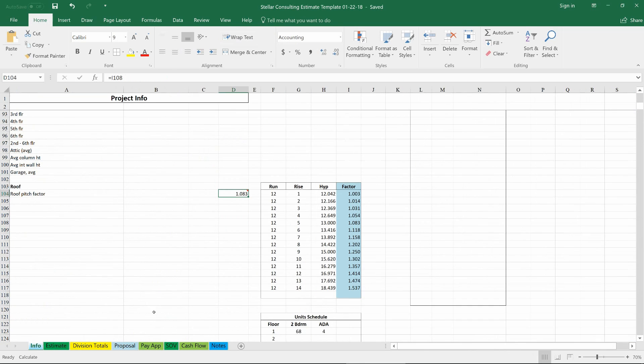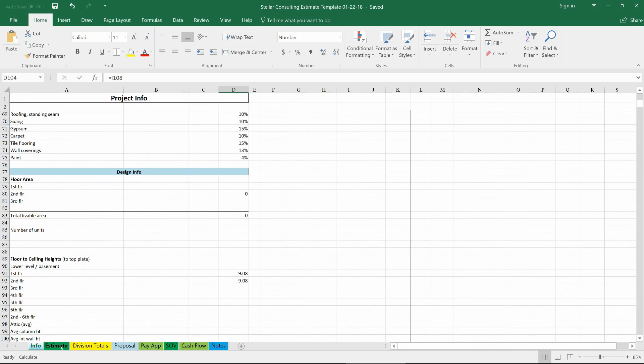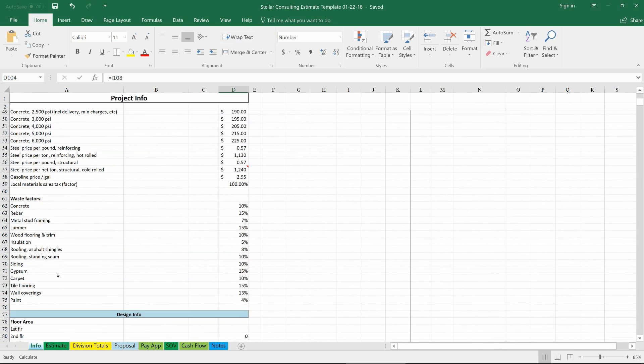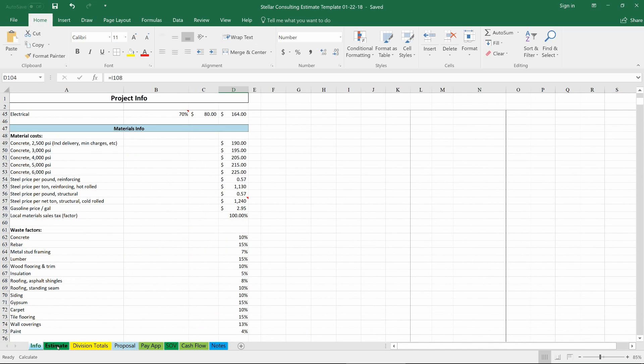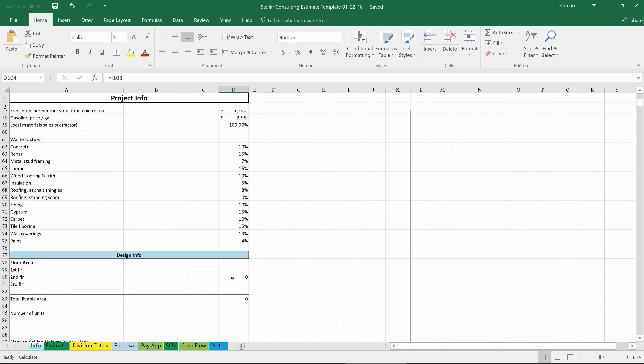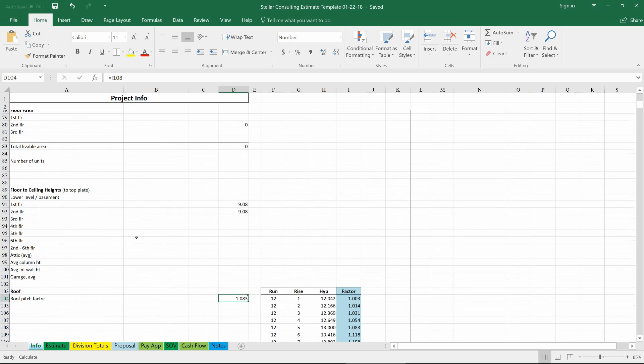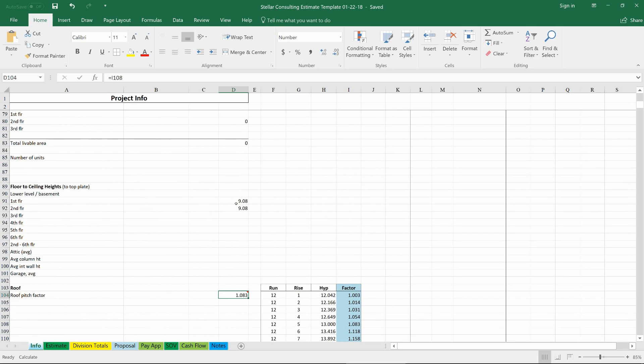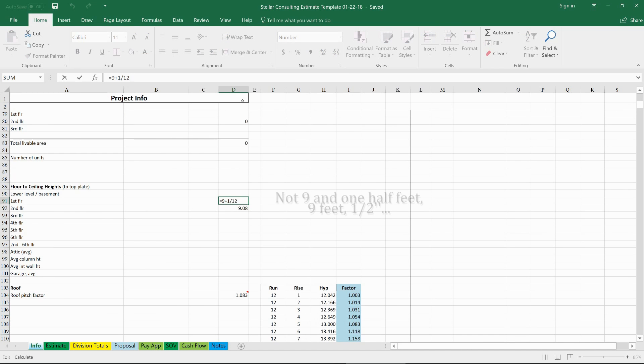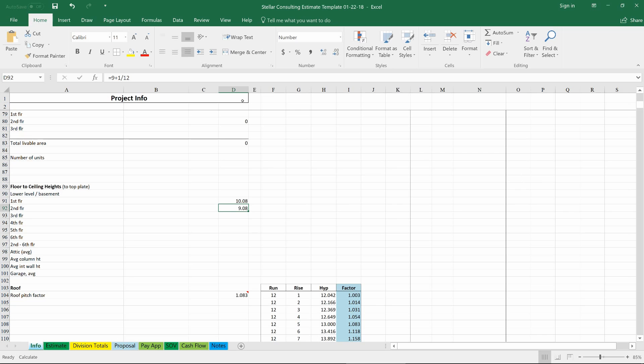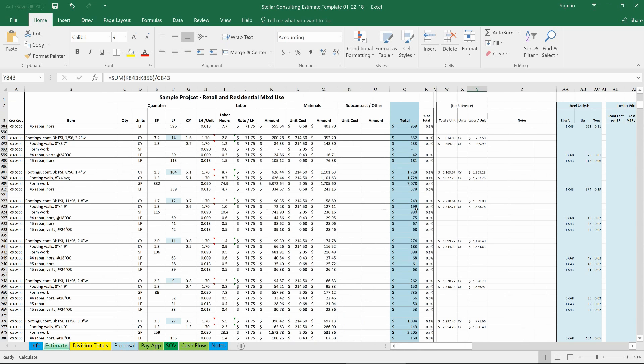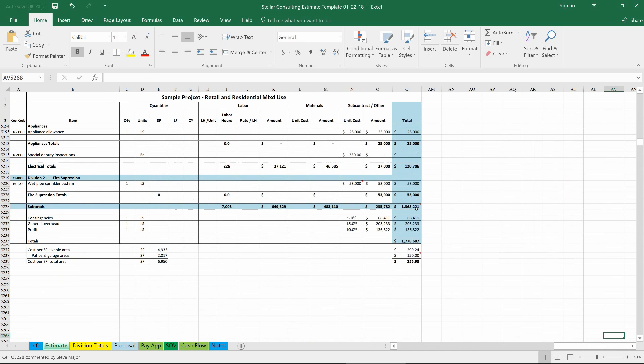A couple of the highlights on this since we have tied everything into the info tab for example the ceiling heights. That's something that's commonly changed during value engineering. So right now we've got a nine and a half foot ceiling height on the first floor and a nine and a half foot ceiling on the second floor. If I was to come in here and add another foot as a possibility we could take a look at the total cost of the project and compare it because everything will have changed.